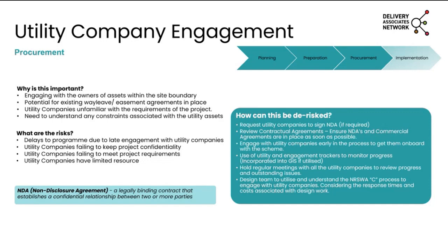making sure that they're familiar with the project and what we require. So as I mentioned earlier, if it's outside of the regular NERSWA process, how they can provide us with what we need, and also get them to understand any constraints from the project, milestones in terms of the project when we need certain items by. You don't just want them delivering everything at the end. There has to be constant engagement as you go along.